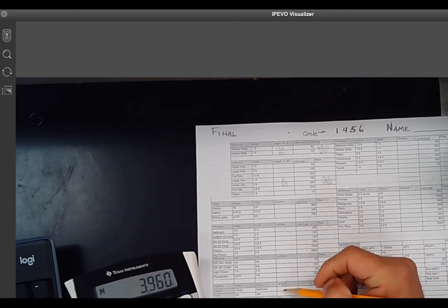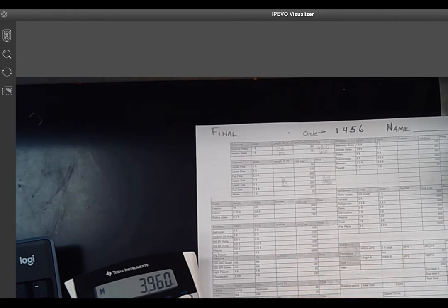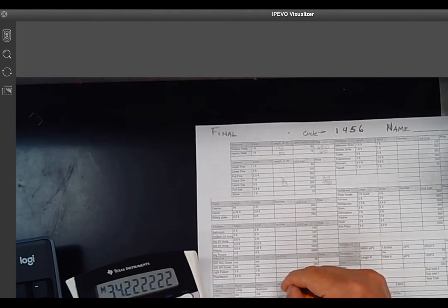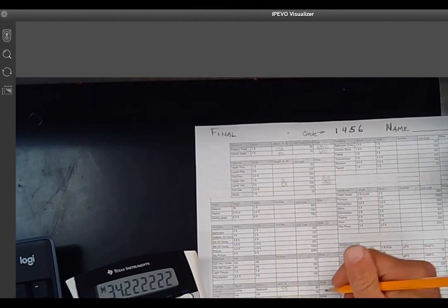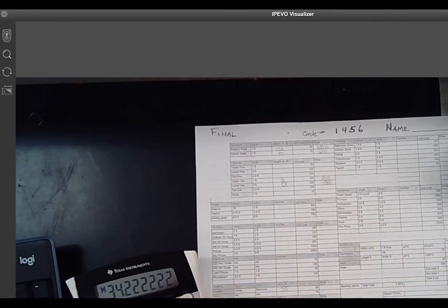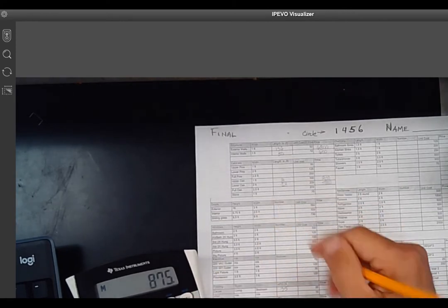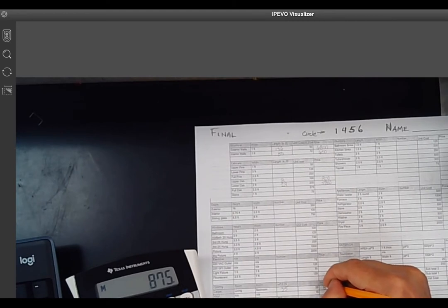Now I'm going to do carpet in the bedroom. Now clear this. 308 divided by 9. Well, this is not a whole number, so you've got to round it up to 35. So that's going to be 35 for the bedroom. Clear it out. 35 times 25, $875.